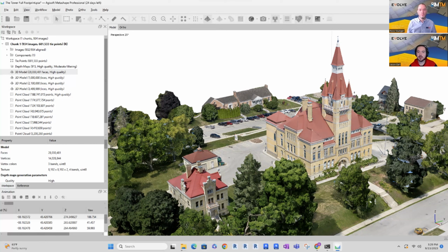And then for us in the office to be able to see that and see the progress of the job, not only are we more aware of where the progress is and the things we need to focus on, or maybe, hey, I was working in this area and they haven't even poured the footings there yet. But it let us get this circle of communication with the field, a lot more real-time information that we could use. Hey, maybe they didn't put that conduit over there. Maybe we talk to them. Hey, why didn't you put it there? Oh, well, this or that, right? And that way we can learn and just have better communication with the field. That was really big for us.